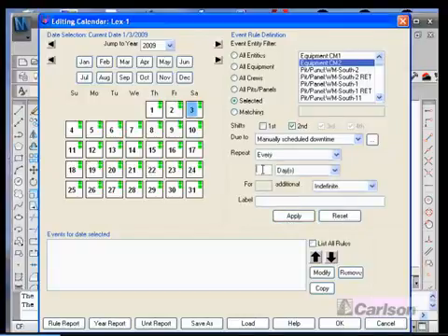We can indicate now every 14 days, every other week, for an indefinite period of time. We're going to schedule a second shift down, and we can say that this is some form of attendance. Apply, and now from now on, that will be down every other Saturday.